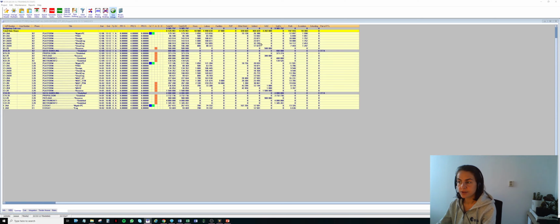So our line turned gray, which means that the corresponding provisions are not included anymore in the total price. And you can check here and have a look at the column subco, where you see that for the data and link, the amount has been put in the column of the subcontractors integration. And you even see here part of ITT, ITT4. So this is really a good way for you to check that the budgetary subco amount has been replaced by the tender answer.